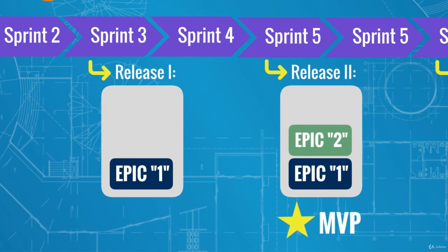The definition of the MVP is a key moment as it sets a clear target for the project, defining the features without which the product cannot be used in any way. With an MVP in place, the organization can start benefiting from the project work and in the meantime collect feedback from early adopters for the following releases, which are still to be done.